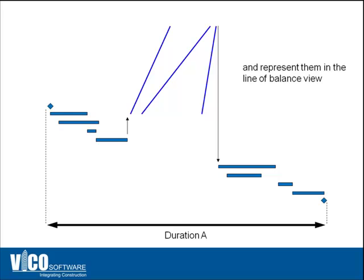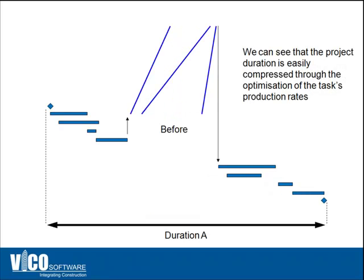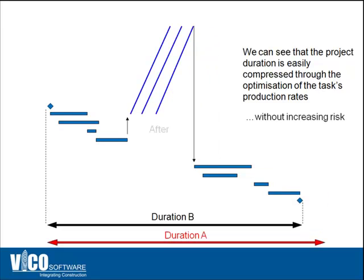By synchronizing the production rate and utilizing locations at the same pace, our customers experience approximately 10 percent compression of the schedule.